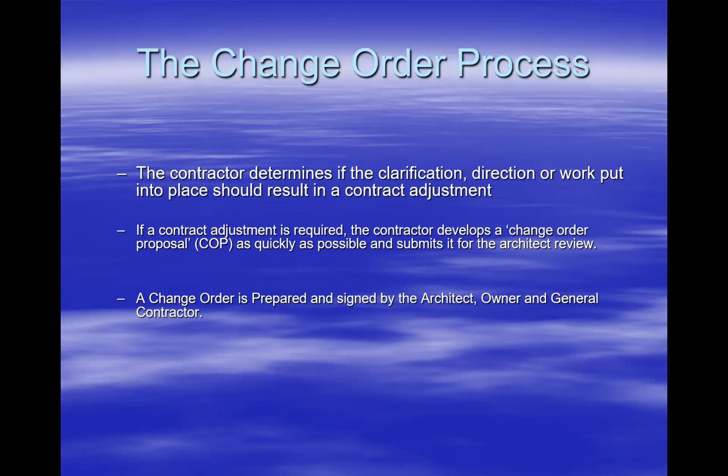Now, I'm going to be honest, architects are different. I know times change, but when it came to these types of change orders, our change order proposal that went to the architect was simply us taking a G701 and, line item by line item, listing all of those PCOs, and then submitting that document to the architect.